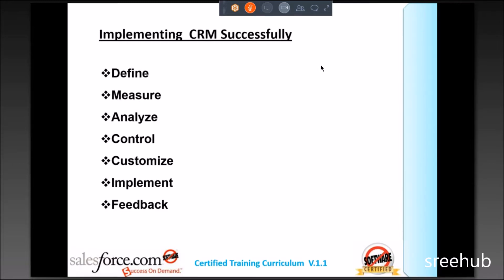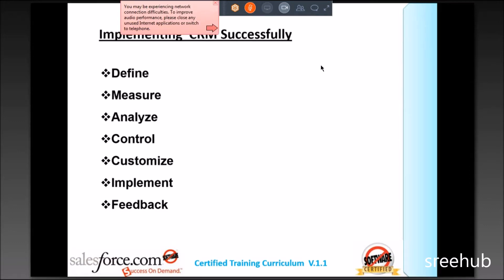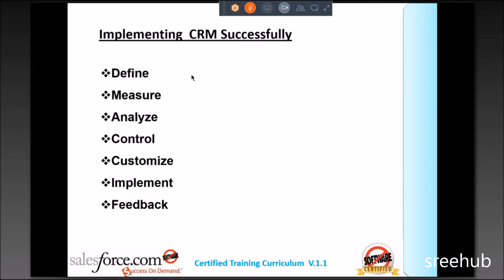The client will analyze everything and in the Control phase, the sign-off happens. In the Control phase, you have: project sign-off, backup plans, and milestone and delivery expectations. The client asks when they can see the first look — for example, in three months you'll complete all forms and layouts. Decisions like weekly Friday calls, which team handles which task — Hyderabad for form design, Bangalore for reports, Chennai for security profiles — and the project coordination by a project manager are all finalized here.